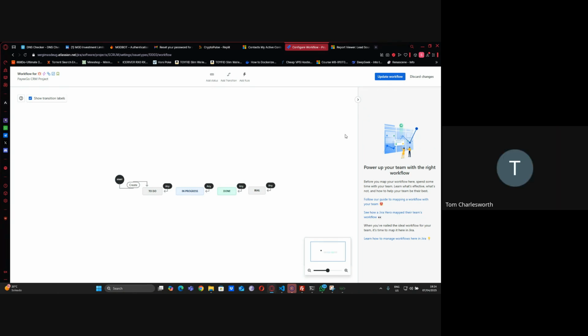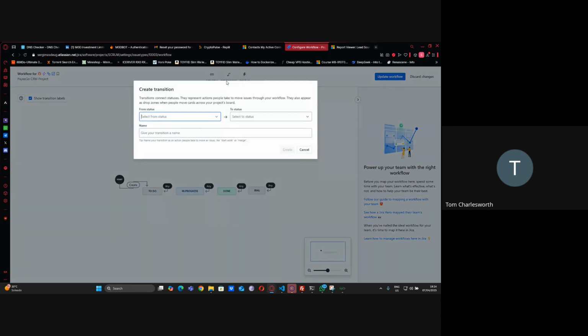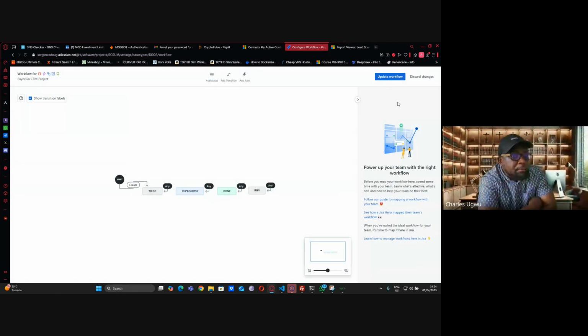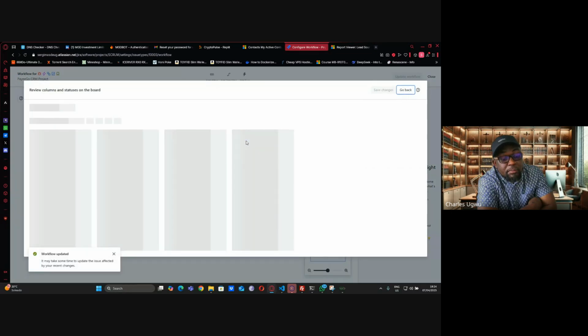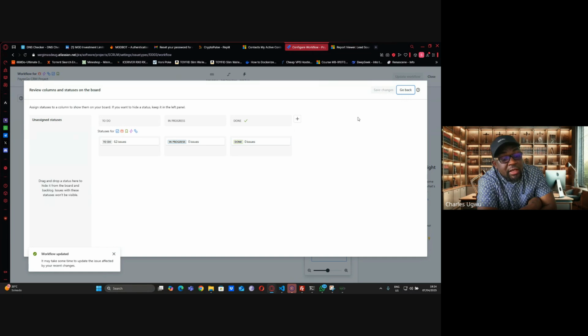No, but our question is: if we have something in the product backlog that's gone into the sprint, and then we found out that the test failed and it's a bug, do we create a new task of the same name that says this is a bug that needs fixing? Or do we take that item that is in the sprint and put it back into the product backlog and just mark it as a bug? Yeah, we need to put it in the backlog, but it's going to be marked as a bug. Developers will then fix the bugs first before any other work.